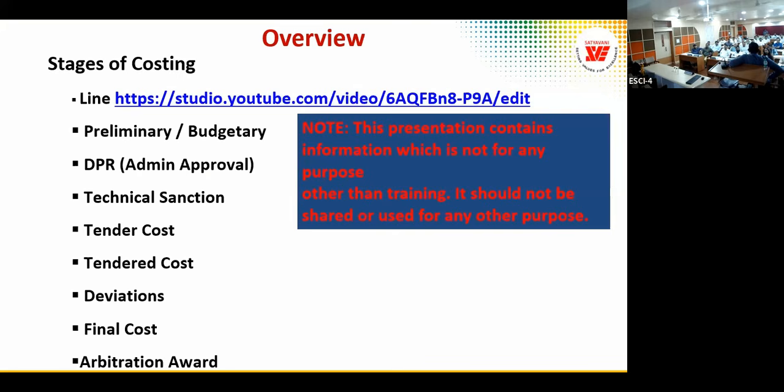Advance was paid with 8% interest, but contractors were not getting money even at the 8% or 15% those days. So contractors started taking contracts at minus 25%. There is no limit in the department, minus 30% also. They just got the advance and sat quiet, didn't start the project. They are enjoying the free loan of 8% interest, and then go for arbitration against the department. So there are so many examples of EPC or this kind of claims.